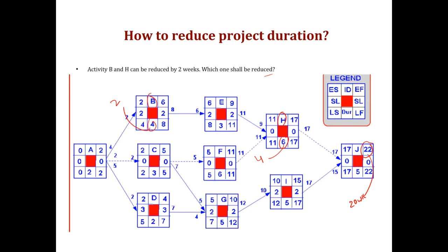So if I could get my, sorry, highlighter working. So here you can see the slack is shown here, and this is the slack of all activities with zero slack. So the path of all the activities with zero slack, which is running through here. So this is the critical path which is running through the project.